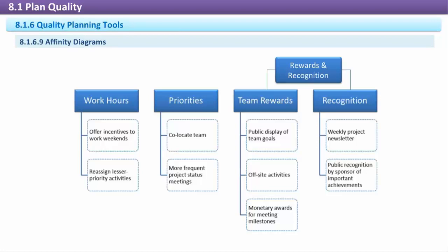Technique. Identify the topic, problem, or issue. Choose a group facilitator. Brainstorm to generate ideas, potential solutions, or contributing factors. Sort the items into similar categories without too much initial thought. As themes begin to emerge, create header categories that establish the unifying relationships between items in the columns. Continue finding ideas and categorizing them until ideas are exhausted and the columns are grouped into categories agreed upon by the group. Construct the final affinity diagram.